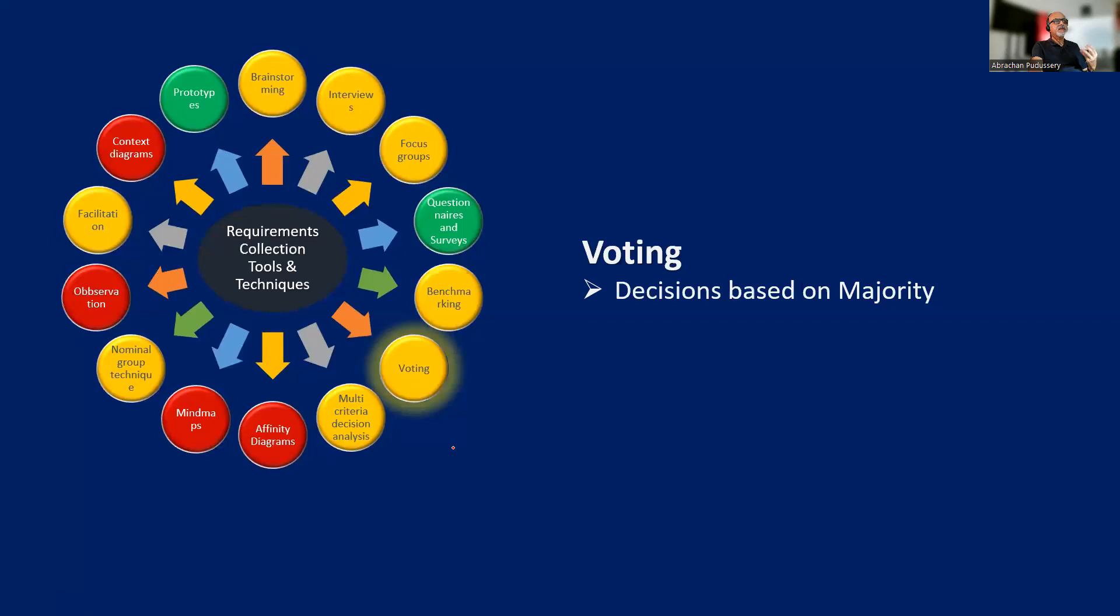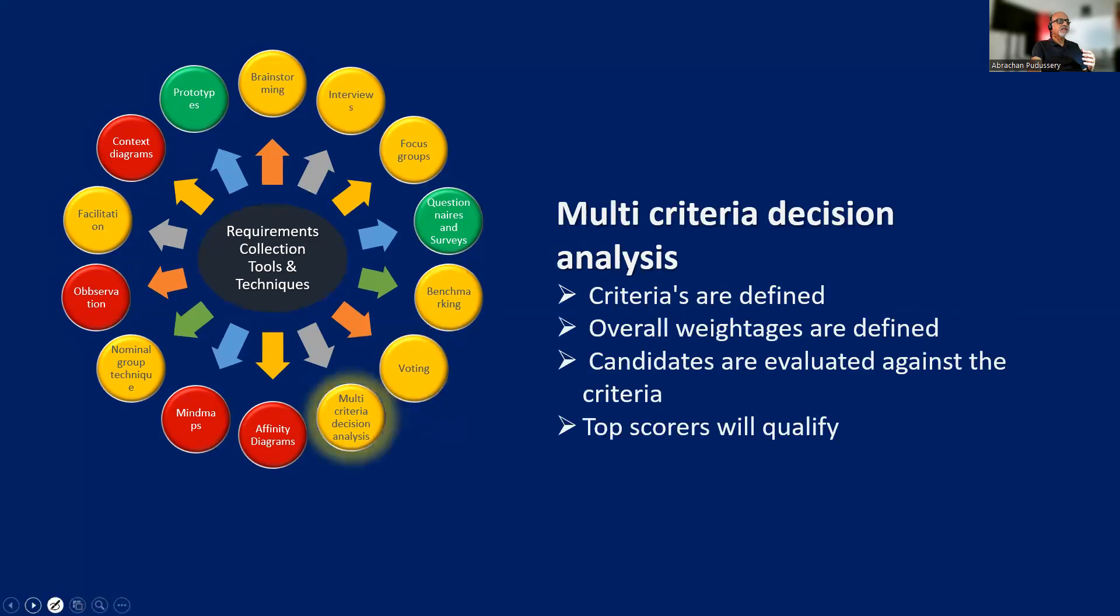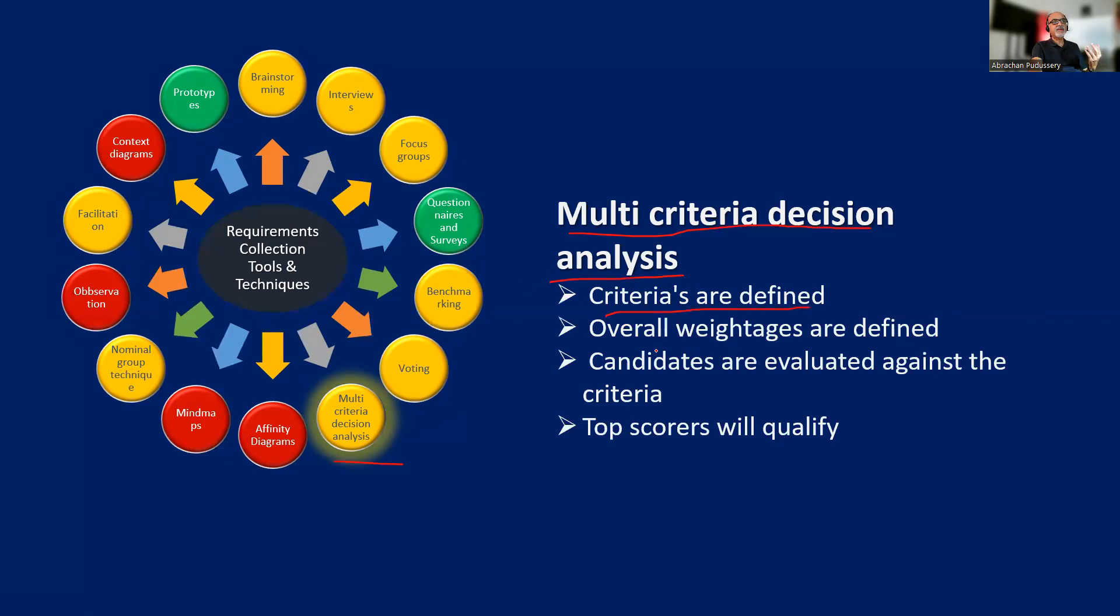The next thing is voting - decisions based on voting. We have multiple ideas, and we have to pick the best, then voting is the best. The next is multi-criteria decision analysis. Criteria are defined upfront, and overall weightages are also defined. Candidates are evaluated based on the criteria. Top scorers will qualify.